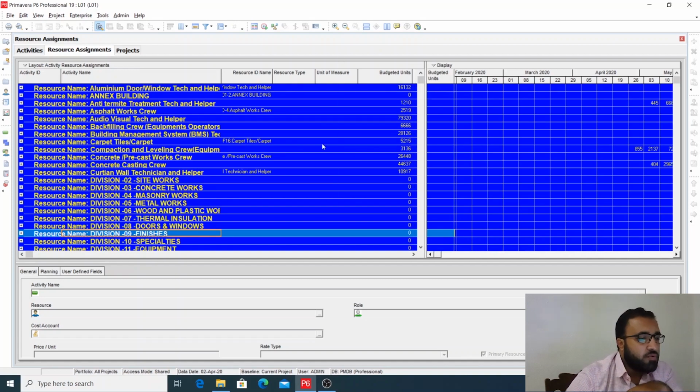To make a histogram, we need the total man hours and the average man hours per day. So we will make a weekly histogram, and what we will do is divide the number of man hours by the total number of man hours in a week. So we will get an average daily manpower in a week. I will tell you how to do it.